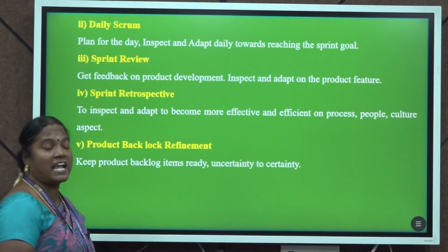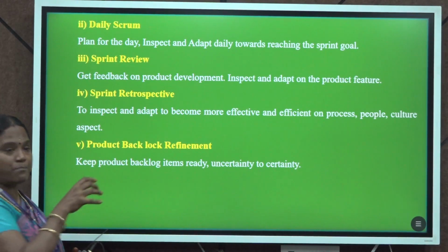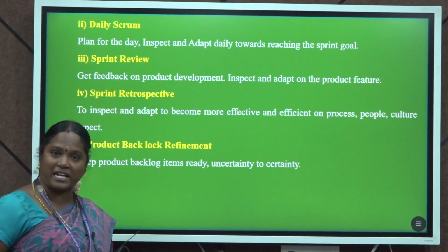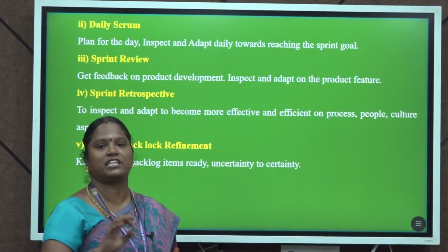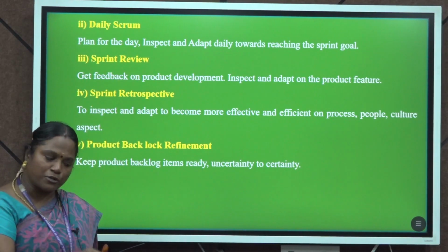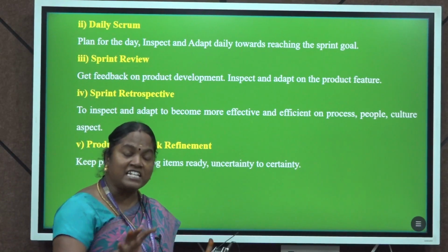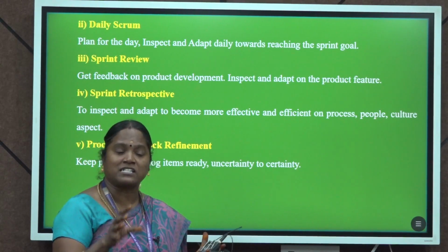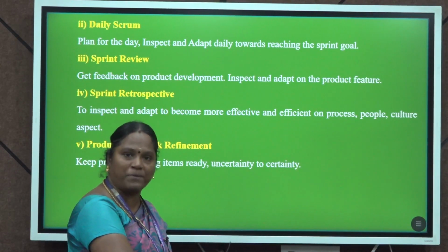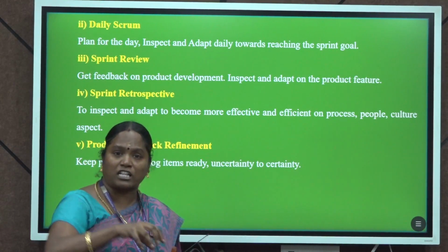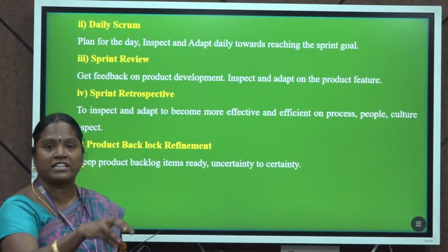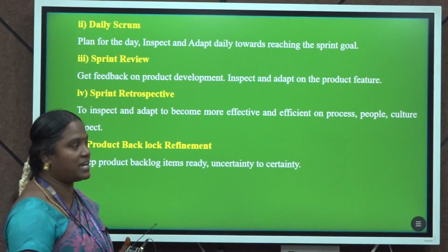Next one is the daily scrum. Each sprint begins with the scrum meeting. This is the stand-up meeting which can be accomplished within 0 to 15 minutes. During this meeting, the entire team is going to discuss what tasks have been completed yesterday, what tasks they are going to work on today, and what the obstacles are in our way. Everything is discussed before the sprint.